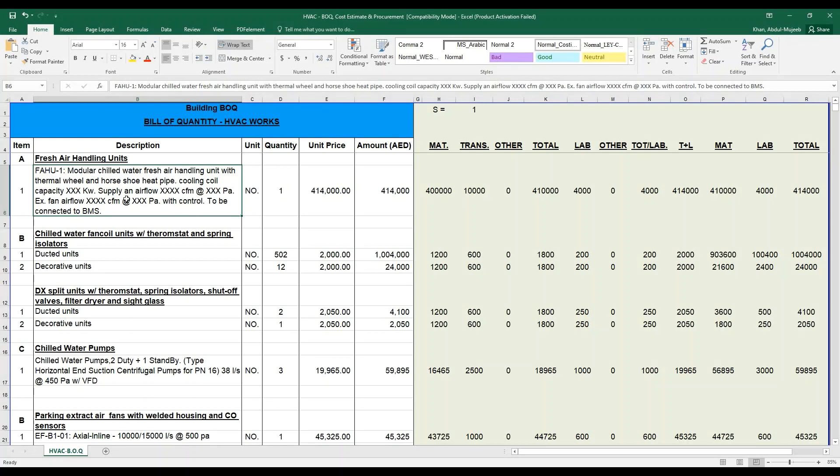Basic information has to be provided in this particular area, which is the combination of your specification and your calculated capacity. This is to be understood by the vendor to provide you the right equipment. Along with the BOQs, you have to attach your specific project specification to be totally described.